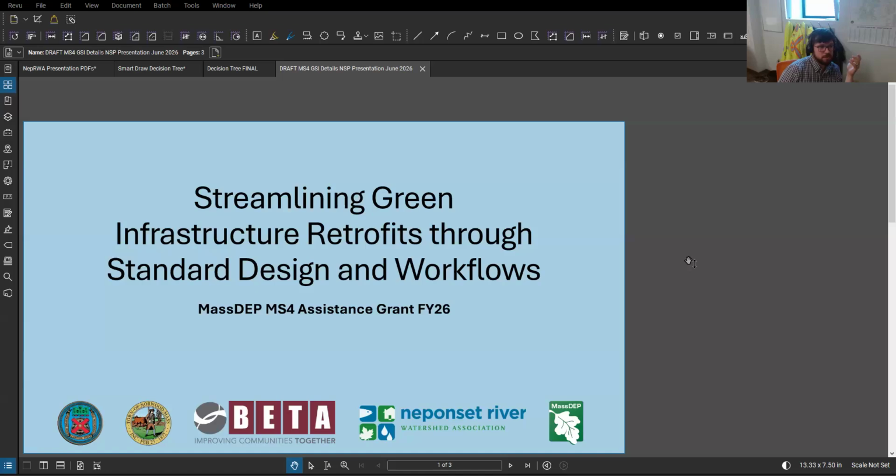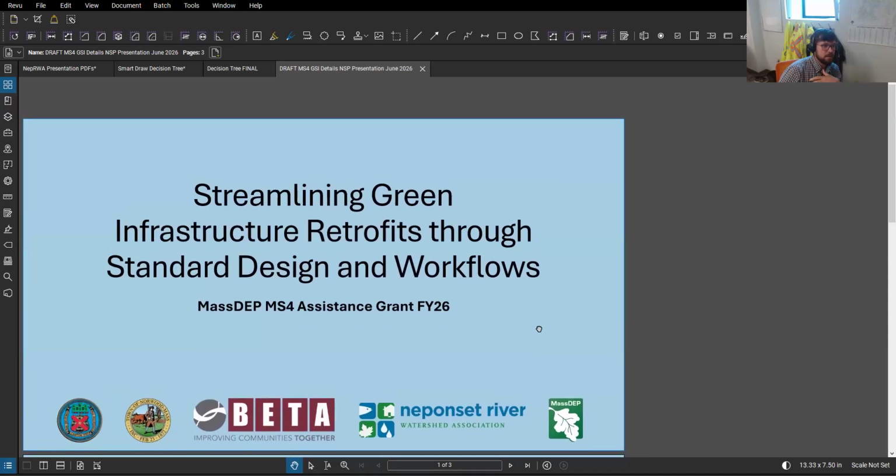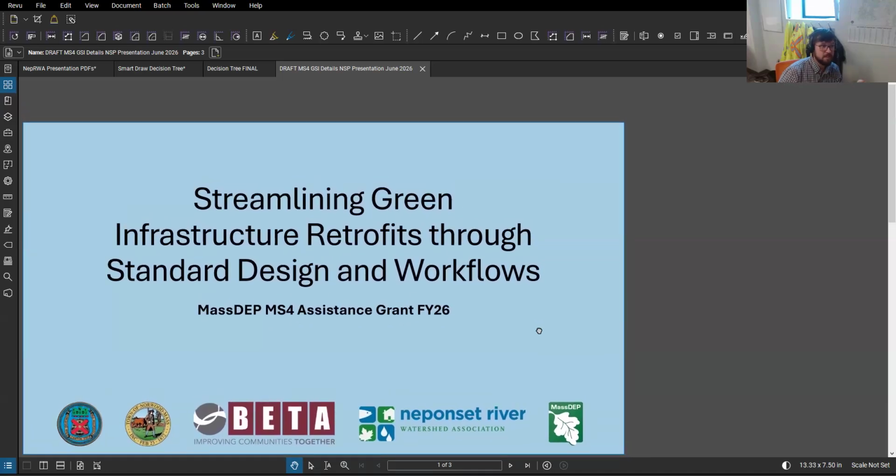You can use Surge. We're part of a regional pooling of certain bid items, and sometimes they're effective. But for real specialty stuff like the infiltration trench, you really should go out, get the capital, get it bid, and get someone that really knows what they're doing to install that stuff.